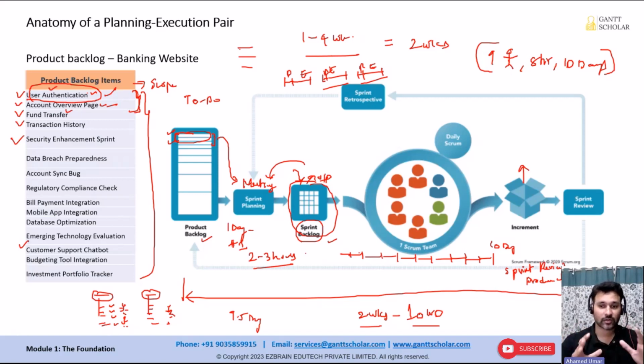Yes. If the product owner is okay with the work, it is done. Maybe the product owner will ask these stakeholders why they are not okay. But for the team, for the Scrum Master, if the product owner is okay, then the work is done. Because only the product owner should give the acceptance for the done work. You understand? It's not that five people should sign off and say this work is done. The judgment will be made only by the product owner. Remember this. You might see this scenario in the exam.